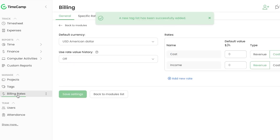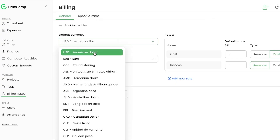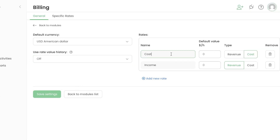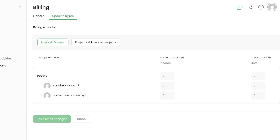For Billing Rates, first select the currency — I'll choose US dollars. You can toggle rate value history on or off. Under Rates, add the cost and income, set the default value type as cost or revenue, and you can add multiple rates here.